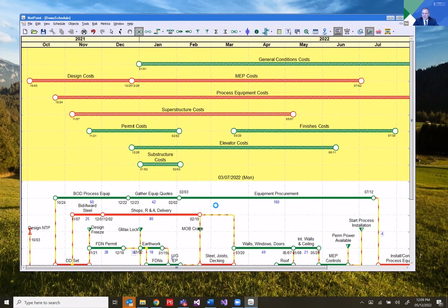You agree with that, Dr. Vivek? So yes, but you would not be able to, in NetPoint, save that baseline as a target for another NetPoint file. That would be the restriction, I would say. Right, good point.